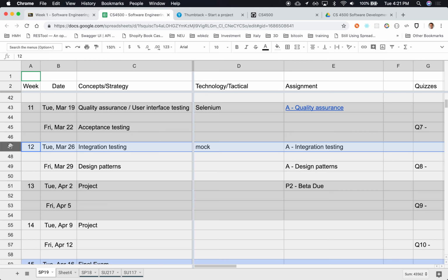So we're going to look at being able to mock or generate dummy data that you could use so that your tests could run independently of things that you are dependent on. How do you break it up in such a way that we're not waiting on each other, so that we can work independently of each other, but at some point we need to integrate. We need to connect these two. Meanwhile, we need to be able to work independently.